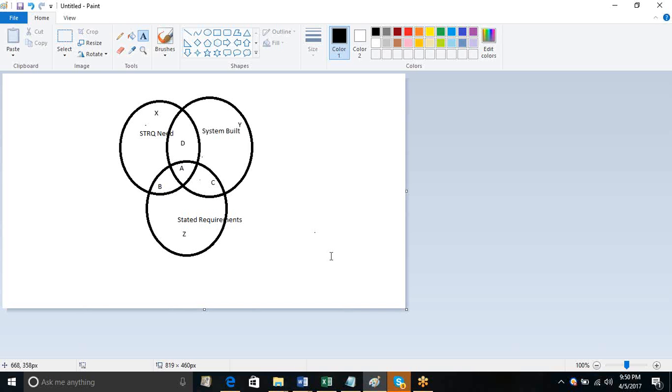One is the one which you kind of mentioned. I want to elaborate on both the aspects a little bit from a practicality standpoint or real world scenario standpoint. One is to say, okay, guys, we have closed down the requirements. Do you understand the impact of adding this requirement to the timeline? Right? That's the first question you need to ask. And if they say, yes, we do, but this is a key requirement we can't miss out, the next question is, do you want it as part of the first iteration? If the answer is yes again, okay, then on the timelines, that's where you involve your project manager.